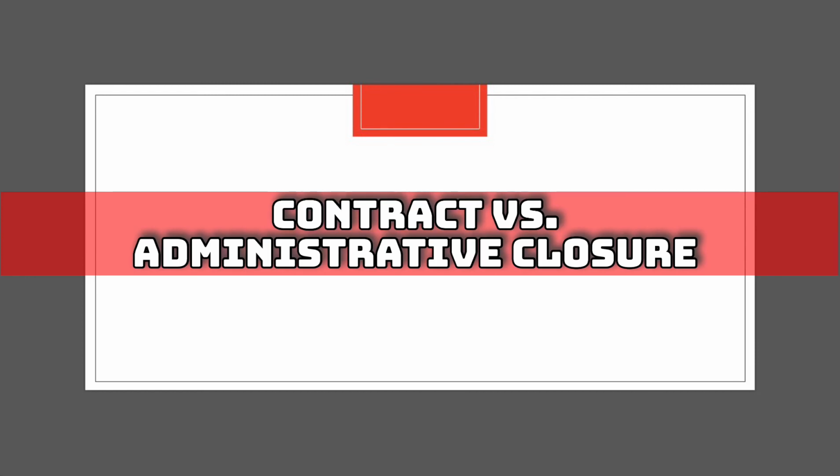However, contract closure and administrative closure both are conducted during the closing process group. We first do contract closure, then we move to administrative closure. Because administrative closure is the final completion and closure of the project or the phase, and we make sure that all the work has been verified, delivered, and accepted. Procurement closure or contract closure are done before project closure. Procurement closure might be done several times throughout the project life cycle.